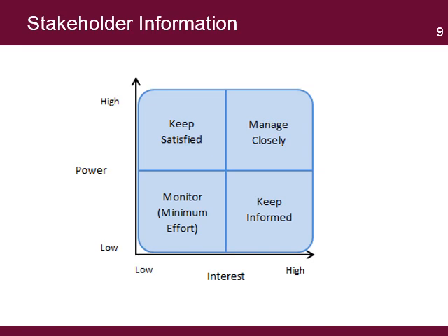This requires a regular review of the stakeholder matrix to see what has changed and modify the communication and relationship building strategies. For example, an environment agency might initially have low interest but high power. Over the life of the project, the agency may change the level of interest to high. In this case, the project should change the engagement strategy from keeping informed to manage closely.